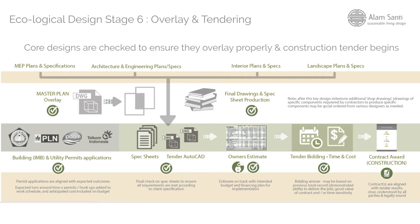Once through tendering — giving various contractors the opportunity to provide quotes on implementation — you select the contractors you feel best about, based on criteria like their portfolio, track record, price, and quality. Then it's time to award contracts to build the project. AlamSanti has great templates for this, bilingual in both English and Indonesian, so there's no chance of misunderstanding or miscommunication about what those contract details are about.